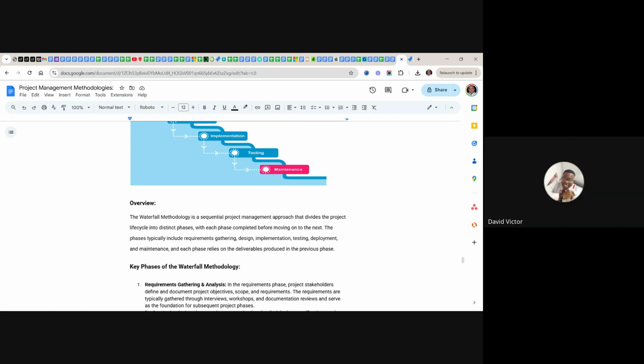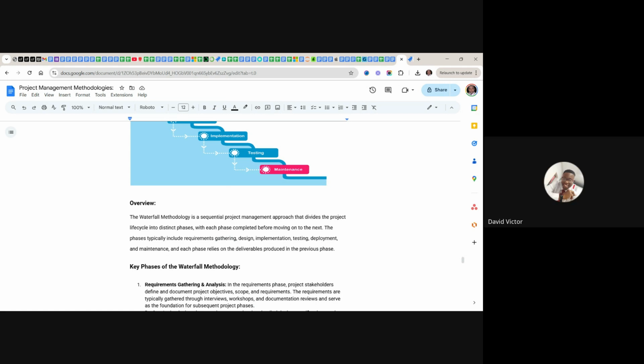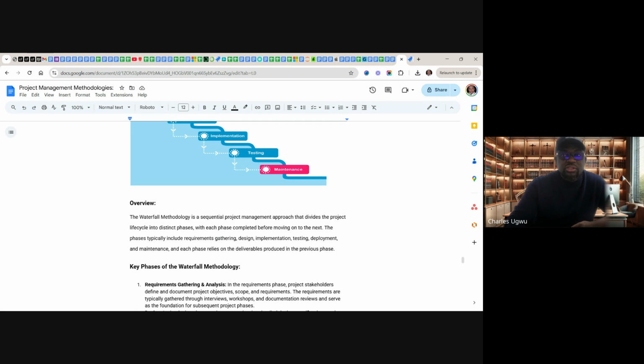Perfect. You mean finish to start, right? Yes, you have to finish before you can start another one. If you can't finish the predecessor, you can't start the successor. Are you getting it? Yeah.